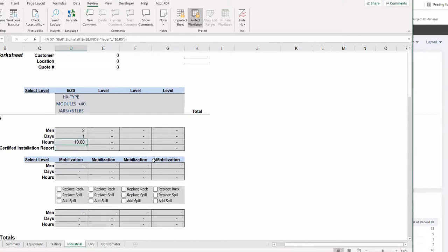If for some reason we're going to do just one thing and we don't need a full 10 hours, we still have to charge an 8-hour day because it's a day rate. We're losing that technician for a full day, basically. He can't go do anything else. So we still charge the 8 hours. So you do have liberties to change it. Again, I'm stepping on formulas, but I'm sure you're savvy enough to know how to bring that back across. You will have the ability to change those things. That's why I left them there for you to change.